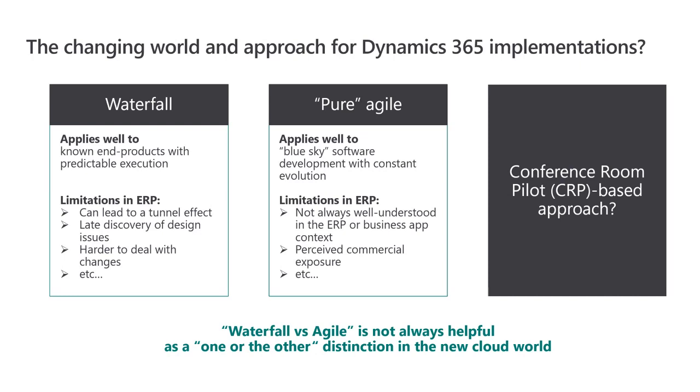And even in a pure waterfall methodology, those phases very rarely fall that cleanly, right? Where analysis finishes cleanly and then you're into design and all design is done before coding or development starts. There's often overlap in those areas, and sometimes those methodologies don't elegantly cope with that overlap.